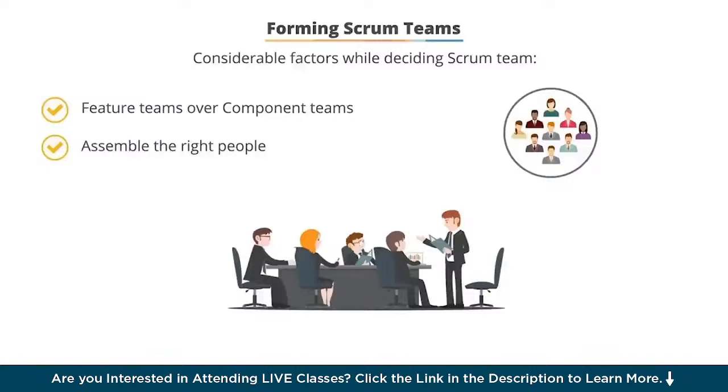Also, one of the risks of a small team is that the team may miss out on broader perspective and dissenting views. One way to work around this is to deliberately favor diversity in all aspects: gender, ethnicity, personality traits, etc. It may take some time for the team to advance through the storming stage of team development and develop the trust necessary to work effectively together, but it can be done. Once a team has been formed, it's best to preserve and assign whole teams rather than individuals to projects. It's best to avoid assigning team members to multiple projects at the same time.